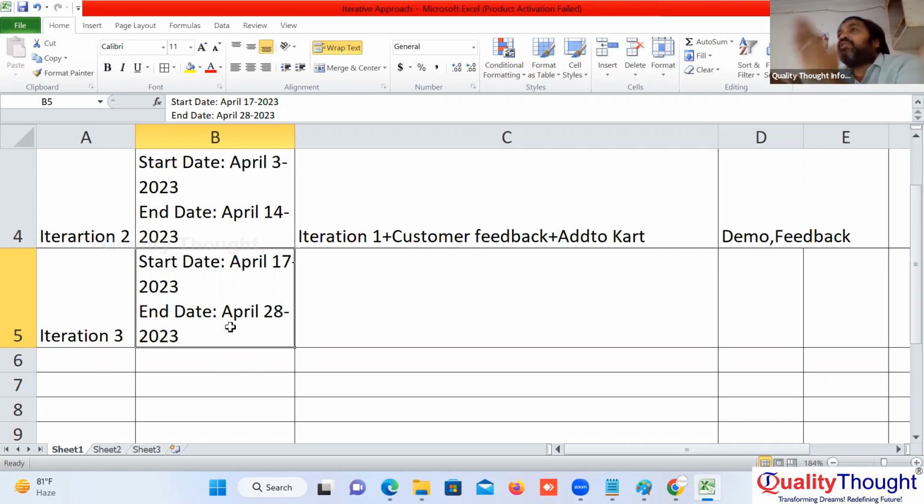The difference between old style and new style. Forget about these technical words. Old style: first complete planning, 3 months. Requirements, 6 months. Design, 3 months, 1 year gone. Development, 1 year. Testing, 1 year. How much duration? 3 months, 3 years. Then release.